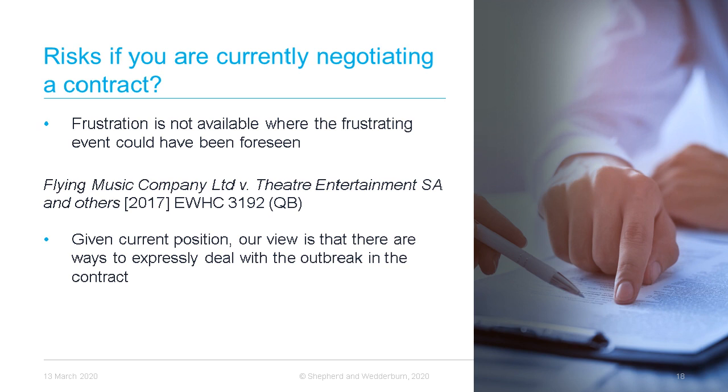And so he's identifying areas where the parties should have ideally foreseen what was about to happen, or could have foreseen what was about to happen. This is an important point if you're currently in contractual negotiations, because obviously whilst the full impact of the coronavirus outbreak isn't known yet, there's a pretty good argument that the contracting parties should be reviewing their operations and contingency planning in response to the current situation. If the impact of the virus becomes more significant, we think that there will be real challenges for parties who attempt to rely on broad force majeure provisions or on the doctrine of frustration to try to avoid liability for their failure to perform if they entered into their contracts when they were aware of these underlying circumstances.